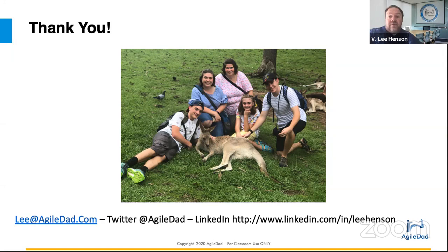Do we add story points for a spike? We discussed that earlier. If the team brings in a spike, should it be given an effort or a time box or something else entirely? This is one of those things where you can do it as a time box. I definitely want to put a box around how long they spend addressing a spike, but I don't want the time box to be associated with points. So you got to be careful there.